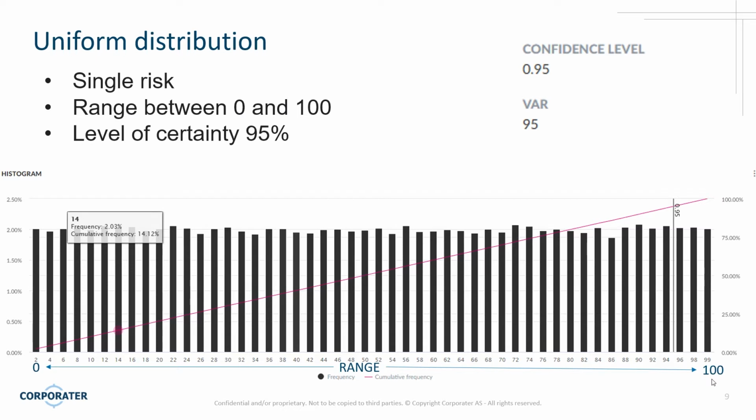This means that in a Monte Carlo simulation, we're going to generate 100,000 random values between 0 and 100. And I'll explain a little bit about how a histogram works here. In a histogram, I'm going to be dumping them into buckets. And I have 50 of these buckets going across the bottom. Basically, the first bucket is between 0 and 2, and then 2 to 4, and 4 to 6, and so on. But we have 50 buckets, and they express all the possible values between 0 and 100. And you can see we get approximately 2% of these in each bucket, which makes sense. And it just shows that they're uniformly distributed, more or less. I mean, it's random, but it's pretty much a straight line across the top.